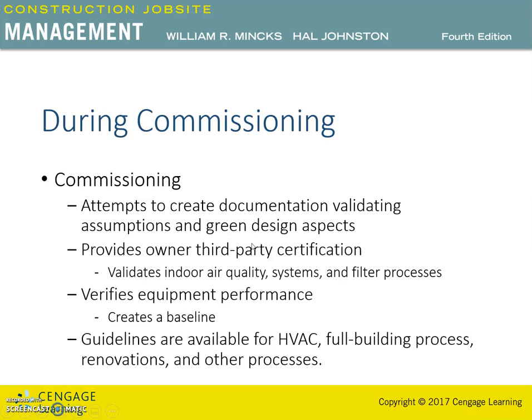The practice of commissioning is more comprehensive than traditional testing and balancing during the project closeout. Commissioning is intended to confirm that the entire facility performs as intended. The guidelines generally followed in the commissioning are related to HVAC commissioning, heating, ventilation, and air conditioning, and the full building process from design through construction.